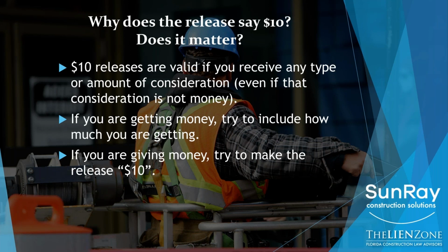However, if the release says $10 and you gave them 20 and they wanted 25, you would say, it doesn't matter because I gave you consideration that you thought was adequate. I said $10, I gave you a $20,000 check, the through date is the end of the month, we're done. So if you're a GC, you would like to have all your releases to your subs and suppliers say $10. It avoids a possible argument in the future that you shorted any payment.